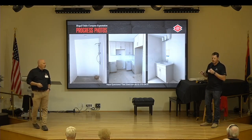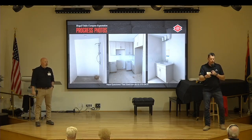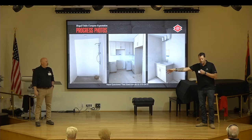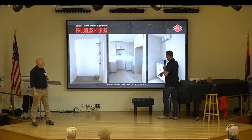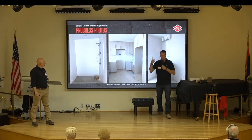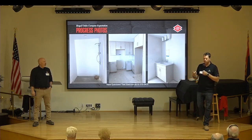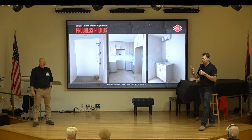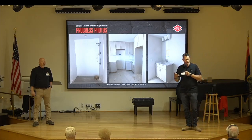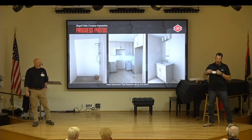The interesting element is the domino effect that Sean was mentioning, of not being able to get inspections in a building because we're in the process of getting Building D turned over. The reason why we don't have flooring in is because we couldn't get the overhead inspection for the corridor. The overhead inspection for the corridor drives the electrical inspection. The electrical inspection drives us getting air conditioning on. Air conditioning on drives climatization in order to complete the flooring operation that is required by the flooring manufacturer. So when you click one domino, 400 of them fall right behind, and you don't even know it.